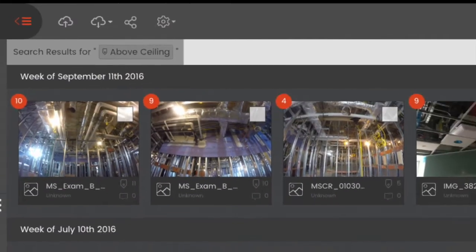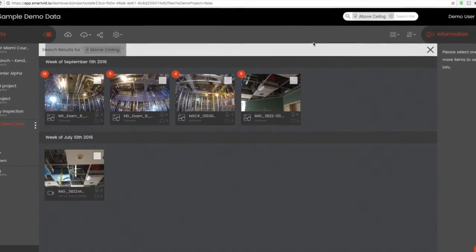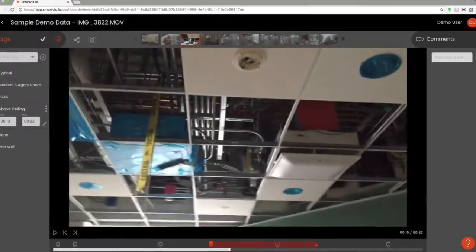There are two ways the machine learning engine can pick up what's in the video or photos. One of them is you can narrate as you're walking around and we'll listen to what you say and then we actually parse it back to the tags you have. Those tags can come from a building information model — like it could be your rooms and floors — so you say 'I'm in the main lobby,' and it could also have equipment in it, or MEP stuff — you can say 'I see ductwork installed.' We listen and then tag it to that specific point in the video.